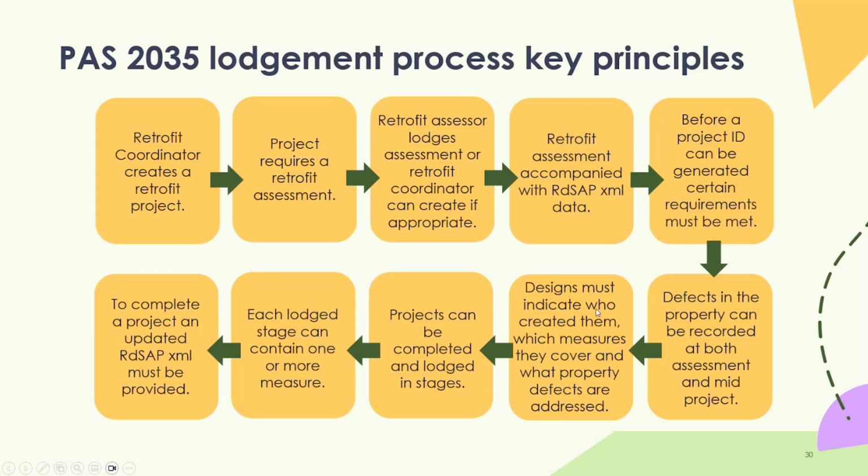Designs must indicate who created them, which measures they cover, and what property defects are addressed. So again, it's kind of trying to keep an important detail about why certain actions are being taken, and those actions are being carried out by appropriate professionals. So competent installers, etc., and the measures themselves are as designed.